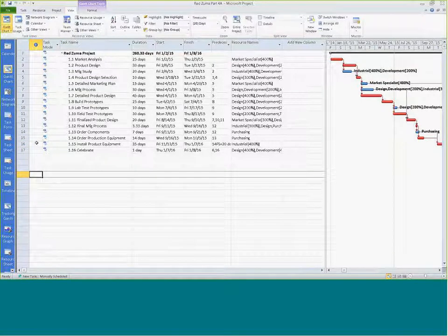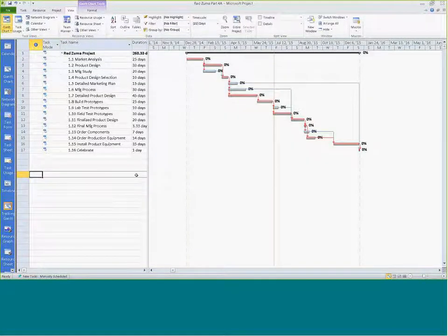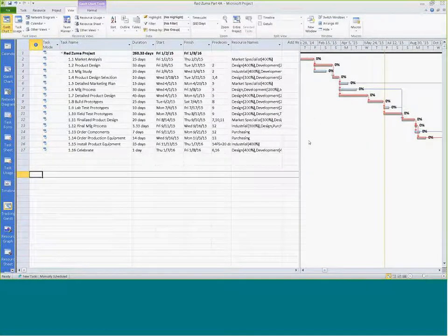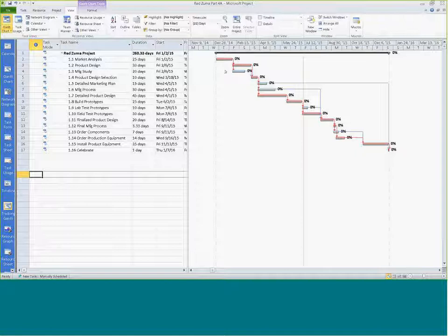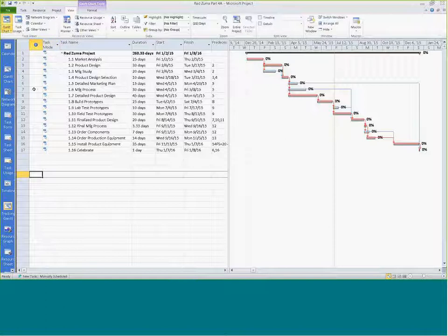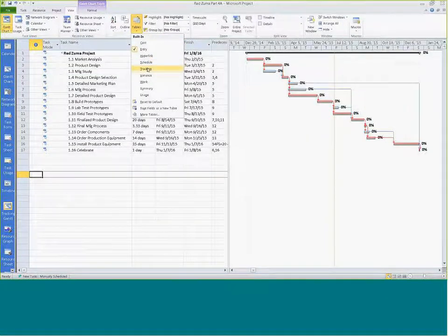Now we're going to make changes. We're going to update based on that table A2.8. So we're going to go to the tracking Gantt. And the tracking Gantt, as you can see, and what we looked at in the chat around monitoring our project, the red and the blue here indicate the project baseline itself. These little gray bars underneath, this is going to represent our progress. So now what we want to do is change the table here. So in the tracking Gantt, from our view bar, tracking.